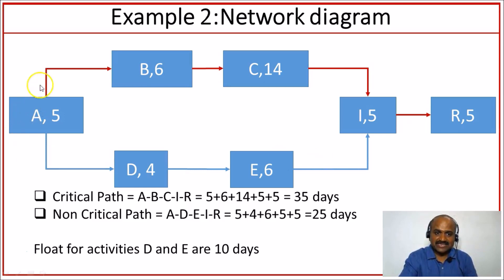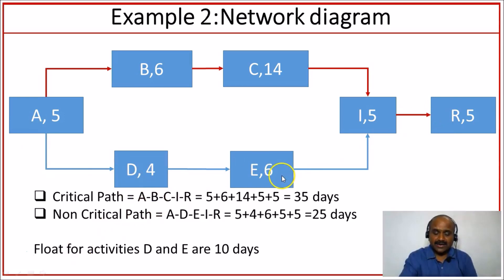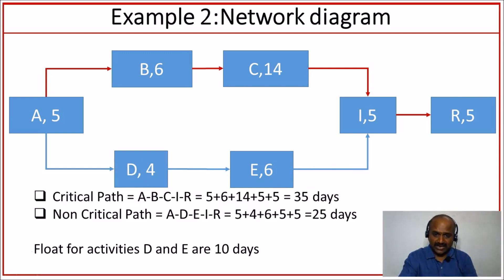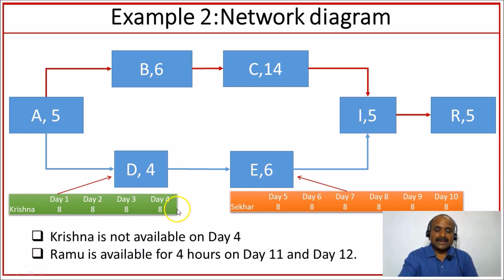The critical path is A, B, C, I, and R. The non-critical path is A, D, E, I, and R. The float available for activities D and E is 10 days — meaning even if you delay Activity D or Activity E by 10 days, the overall project duration will not be impacted. It is planned that Krishna works on Activity D for 4 days and Shaker works on Activity E for 6 days.